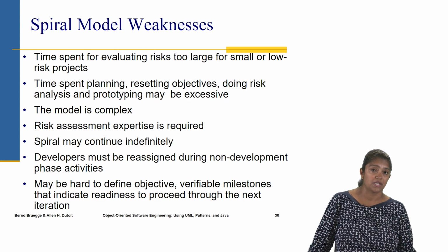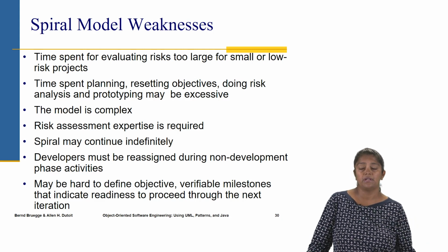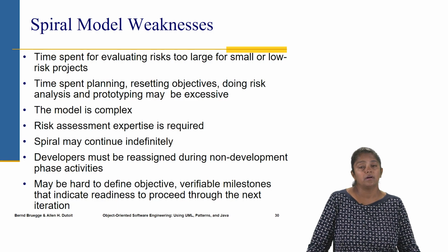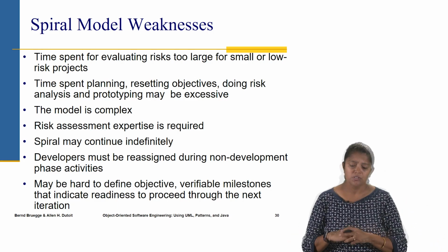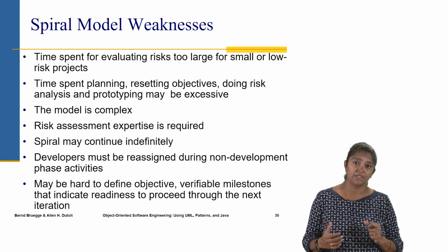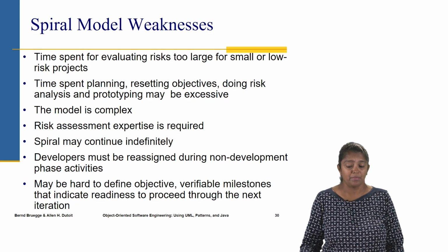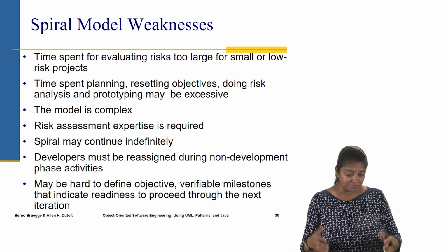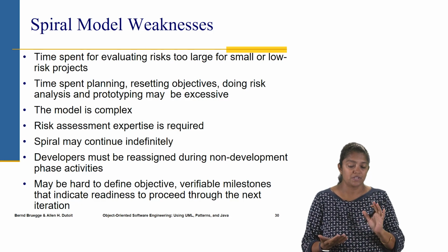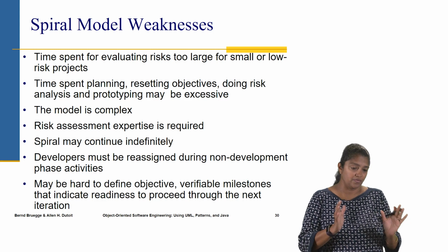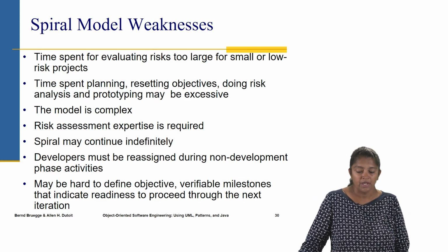It needs risk assessment expertise. It cannot be done by just any regular software engineer. It needs an expertise in risk analysis and assessment. Also, the spiral may continue indefinitely, so that's another issue with it. It may never stop. So again, because of the nature of this model, I repeat that it's not a good idea for the smaller, low risk projects.